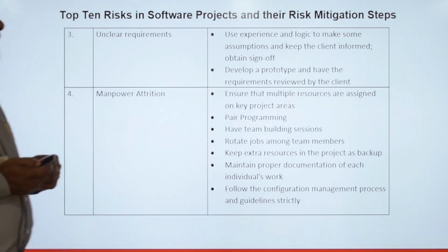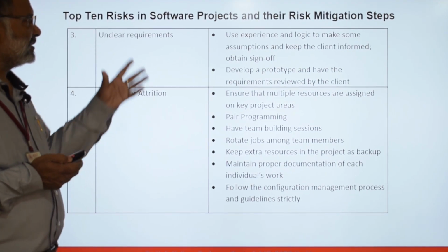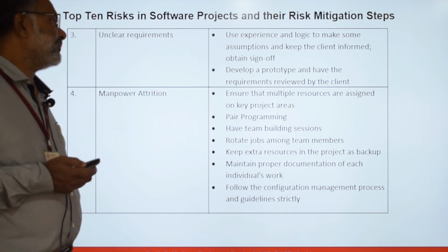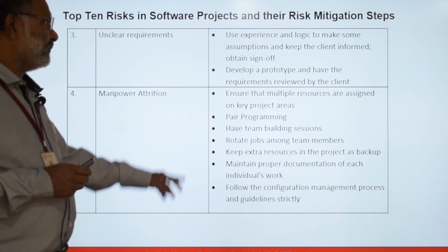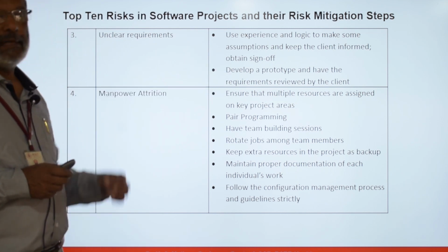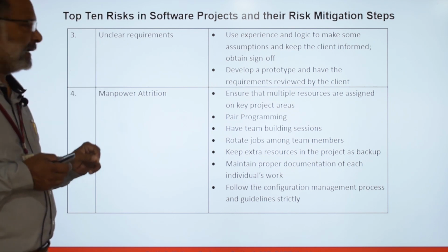Unclear requirements. So this is also a common problem. So what are the mitigation steps? Use experience and logic to make some assumptions, document the assumptions, keep the client informed, and obtain the sign-off of requirements and assumptions. Develop a prototype and have the prototype reviewed by the client, which will help you to make the requirements clear.